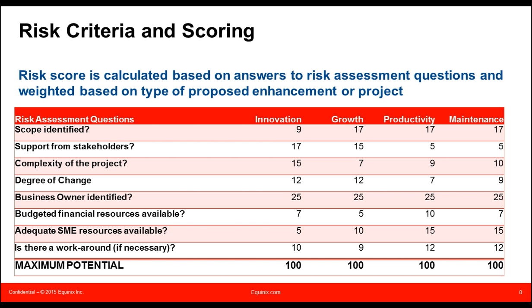It'll look at all of the demand that is also within the same pre-qualified stage and force rank them against each other based on answers to each of those questions, the overall score from a risk, value, and cost perspective and return on investment perspective, and give it a forced rank from 1 to n. And that would give us an initial idea of what we think from a quantifiable perspective makes sense for us to deliver as enhancements in projects.